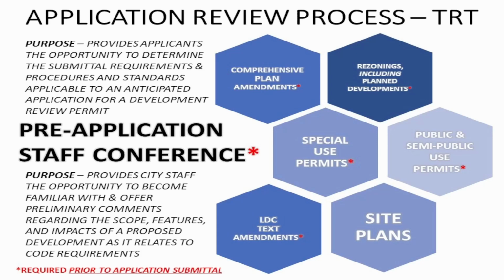We also provide the opportunity for individuals to schedule pre-application meetings as a courtesy for other types of applications, whether or not they require that. That would include site plans, which typically don't require the pre-application meeting, but it is often a benefit to individuals seeking to develop within the city to have that meeting with staff to kind of understand what will be required of them as they move through the process.